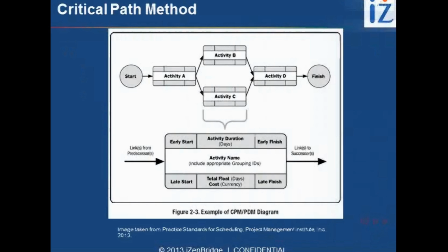So if I list down all these activities and then make a schedule of these activities, by way of identifying dependencies, like I can't wear the clothes before I have a bath, something like that. So we make those relationships, and after making those relationships, we identify what would be the duration I am estimating in order to get ready for the office. So in the critical path method, we derive these activities, we derive the relationship among those activities, and on the basis of the relationship and the estimated duration of these activities, we identify what would be the project end date.